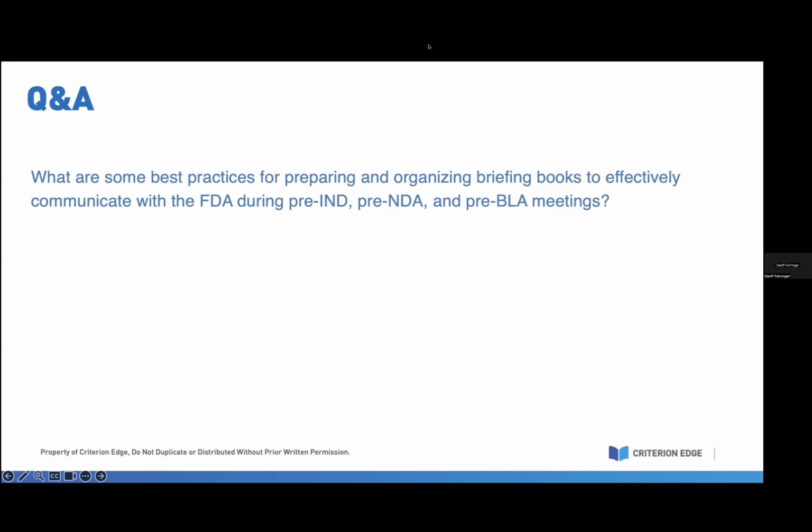So ensuring everybody spends time around those questions, understanding what you need out of those questions and what you're really asking and how do you word them. That is critical, that everybody is involved. And then you understand what's your project plan? So if you're applying for a meeting on this date, when do you have to have your briefing book complete? So create a project plan, and that project plan needs to be managed so you're sticking to it. Otherwise, everything comes in at the last minute. You don't have time to do maybe enough reviews, or something gets missed because everybody's panicked because development still goes on.